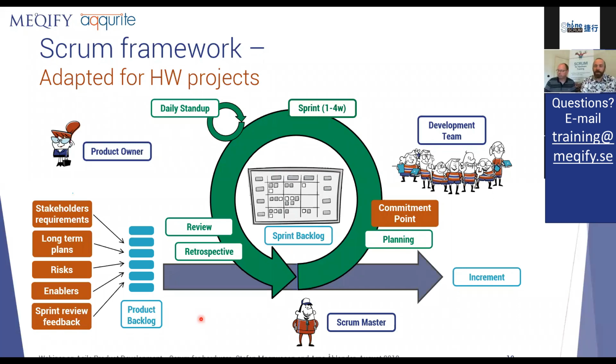It's also really hard when you do a sprint planning to straighten out all the question marks, so to say. I mentioned that some of the work is done outside the team, and when you do the planning and suddenly need something from outside the team, let's say you need a legal expert, you can't say during the planning, as a team we commit to this work and to deliver it, because it depends on whether we find the legal expert in time or not.